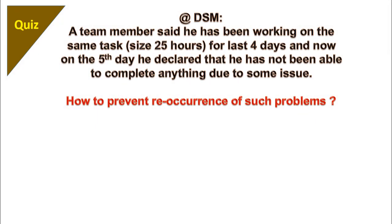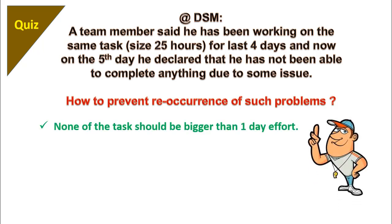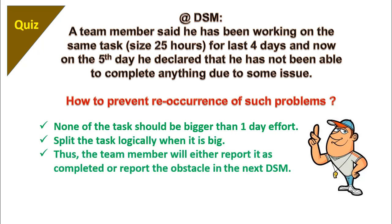Next question: a team member has been working on the same task for the last 4 days. The task size was 25 hours, and now on the fifth day he declared that he has not been able to complete anything due to some issue. How to address such problems? None of the tasks should be bigger than one day's effort. Split the task logically if it is bigger than that. Thus the team member will either report it to be completed or report the obstacle in the next daily standup meeting. Fail fast, fail cheap.